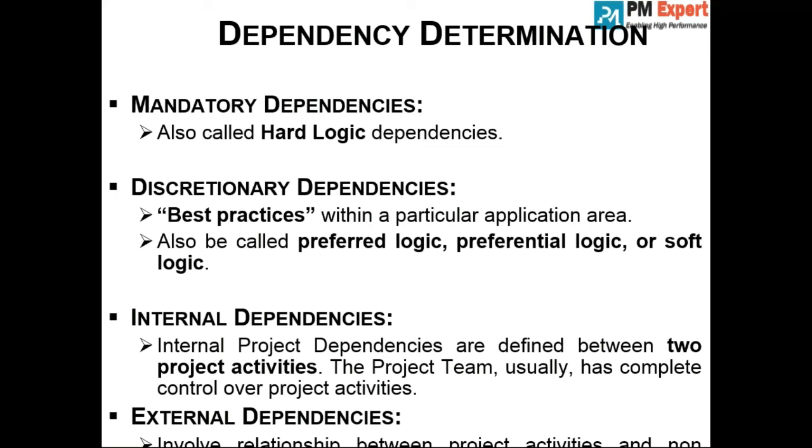Can you create a wall without creating a foundation? Yes or no? No, you can't do it. So the dependency between foundation and construction of the wall is what? Mandatory. Can you test a deliverable without creating it? No. So this is a kind of mandatory dependency. Or any kind of government approval required for a construction project is a mandatory dependency, right? These are called hard logic.